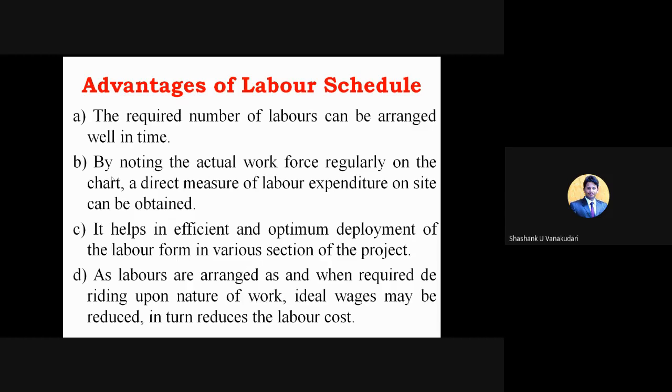So as simply as we can say, the availability number of labors is directly proportional to the time duration. If more labors are required, easily the total duration is going to be reduced. Similarly, the cost may increase because instead of 10 members they are working with 20 members. So for 1 day, instead of paying for 10 members, we are paying for 20 members. So like that, even the accounts will get affected when we increase the number of labors, and it may even react with cost also.